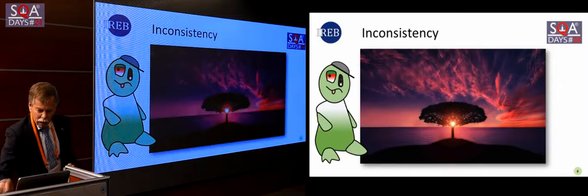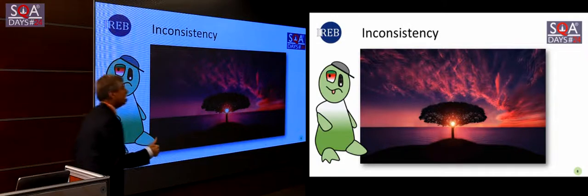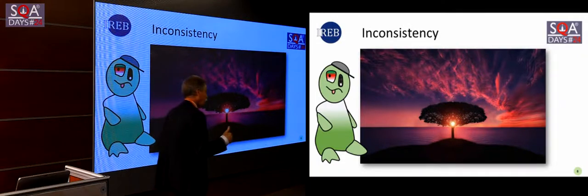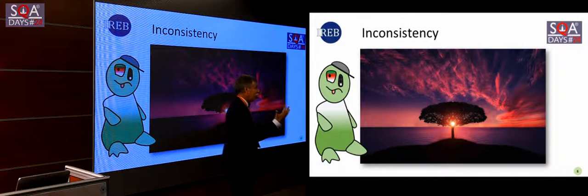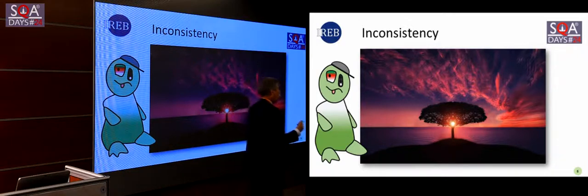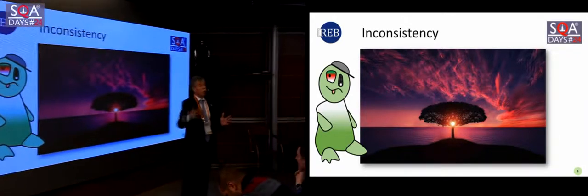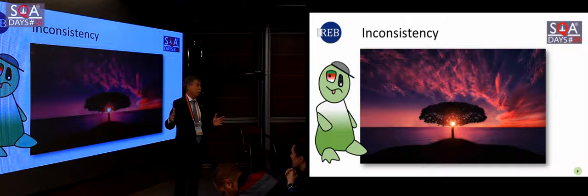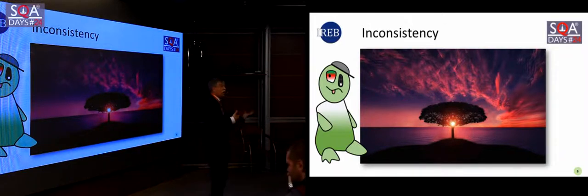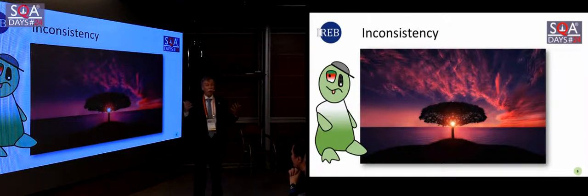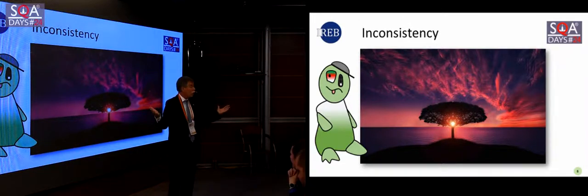But what was really happening? We had inconsistency in our requirements. We had a formal written specification of 5 seconds, and we had an informal, not documented requirement: the new system should be at least as good as the old system. And they were inconsistent, but because this informal requirement was not documented, nobody knew about it.